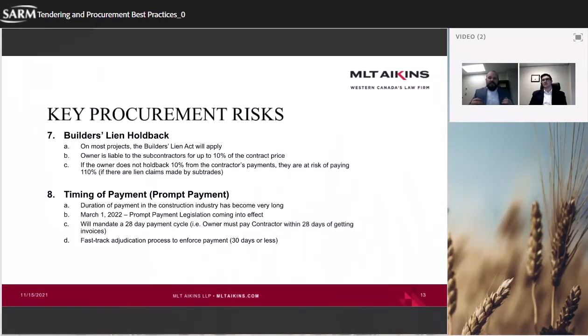And so there's going to be a lot of preparation for all of our owners, public and private, to ensure that they can be compliant with the requirements of that prompt pay regime, and understanding that the administrative certification of those payments, where sometimes owners used to take 20, 30, 40 days to ensure the accuracy and not overpayment, that timeline is so much more reduced now, that we want to ensure that we're creating a compensation regime that aligns with that.